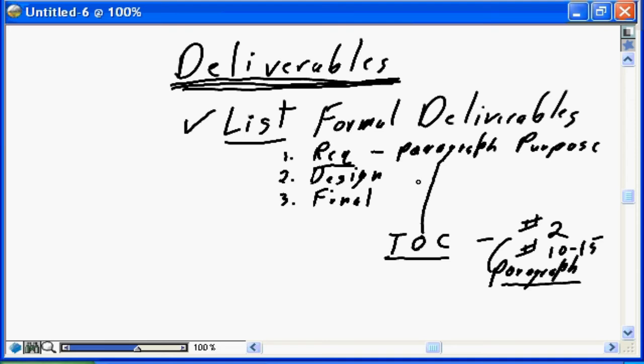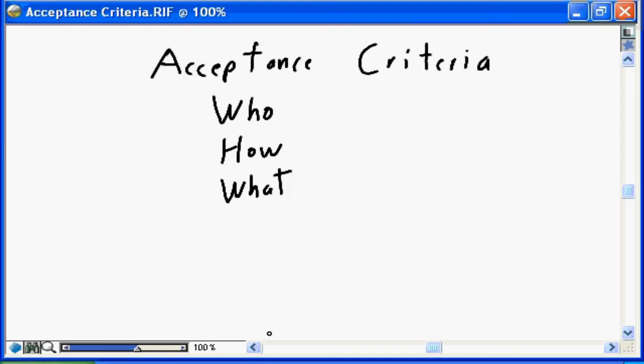I will get the benefit from this project that I expect to receive. The next step in the process is to define the acceptance criteria. How are each of the deliverables, each of the end products for your project going to be accepted? Only by clearly defining the acceptance criteria, i.e. only by defining the yardstick, the measurement factors that will be applied against the deliverables, the final products, will you truly be able to define the scope of what those end products should look like.